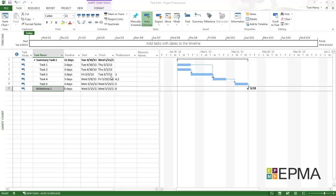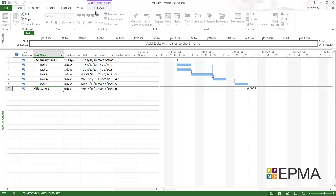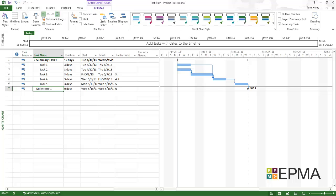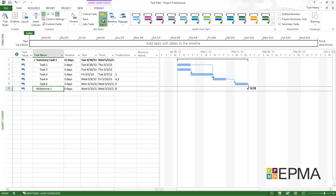Now what I want to do for milestone 1, I want to see which tasks are predecessors. So the new feature will allow me to click on milestone 1. I'm then going to go to the format ribbon. In the bar style section of the format ribbon we'll find the task path highlighting feature. I'm going to click on that. I get four options.